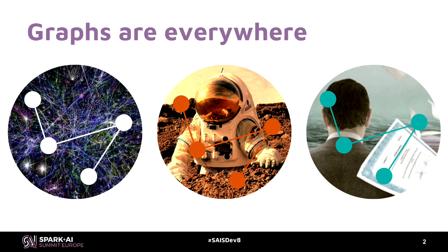So what he did was he did topic modeling based on these engineering lessons learned, and made it much easier for engineers to find out what previous lessons had been learned that could apply to the current problem at hand. And he said that engineers working on Project Orion benefited from engineering lessons learned decades ago during the Apollo era based on that. So essentially, linking up these different lessons learned made them much more useful because it wasn't anymore just a keyword search, but you could actually see how the lessons related to each other and what other lessons might be applicable to your problem.